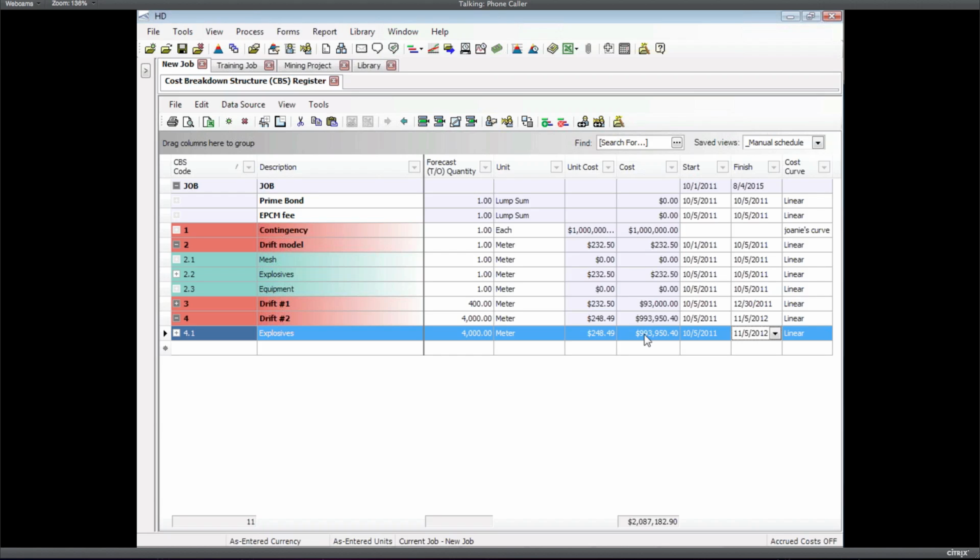You can define the work schedule manually. On Microsoft Project and Primavera, we'll recognize that 400-day duration, so if you change the start date, 400 days later will be your finish date. If you move the start date up, 400 days from that will be your finish date. But when we do a manual schedule, based on how we see people wanting to use it, we're basically saying, hey, all bets are off. You go in and put in whatever you want. You're kind of on your own.